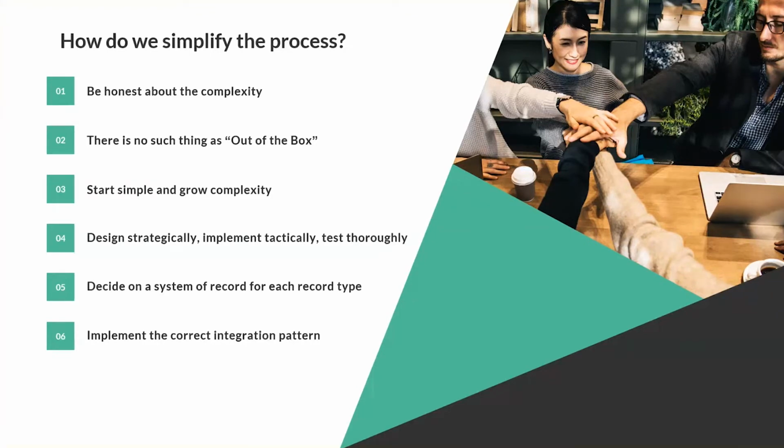And that's really where the budget part of this comes from as well, because a lot of times as a part of a pre-sales process or when you're scoping things or planning it out in a sprint, it's awful easy to underestimate that complexity, and you'll end up going over budget and have systems that don't work or don't work correctly because you ran out of budget or ran out of time to get it done. So really try to be honest with the clients about that.